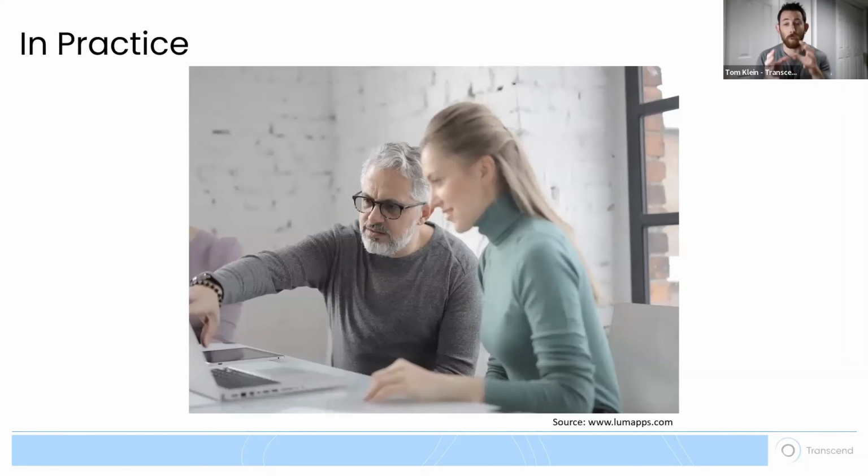Long story short, before I move on, one final way you could engage some external stakeholders around this hypothetical scenario: a lot of times you might find yourself in a position where the only person in this scenario that you need approval from is the township engineer. In that case, they're going to understand a lot more of the intricacies of the project, and you could potentially take the software with you to a meeting with that township engineer, and directly input values into the tool with them and make them an active participant in the design process, making it much less likely that you're going to receive some form of rejection stalling the project.